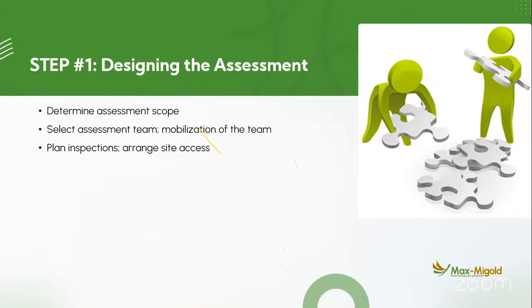But when you are talking about component-wise, that means you pick every component within the building and assess them each at a time. You take the chair, what is the length of the chair, what is the breadth, what is the height, what is the condition of the chair. The chair, does it have all these casters? What are the condition of the casters? Out of the 4 casters, how many are good? How many are not good? So it's like you are looking at each and every component within that facility holistically, not as a system-wise.